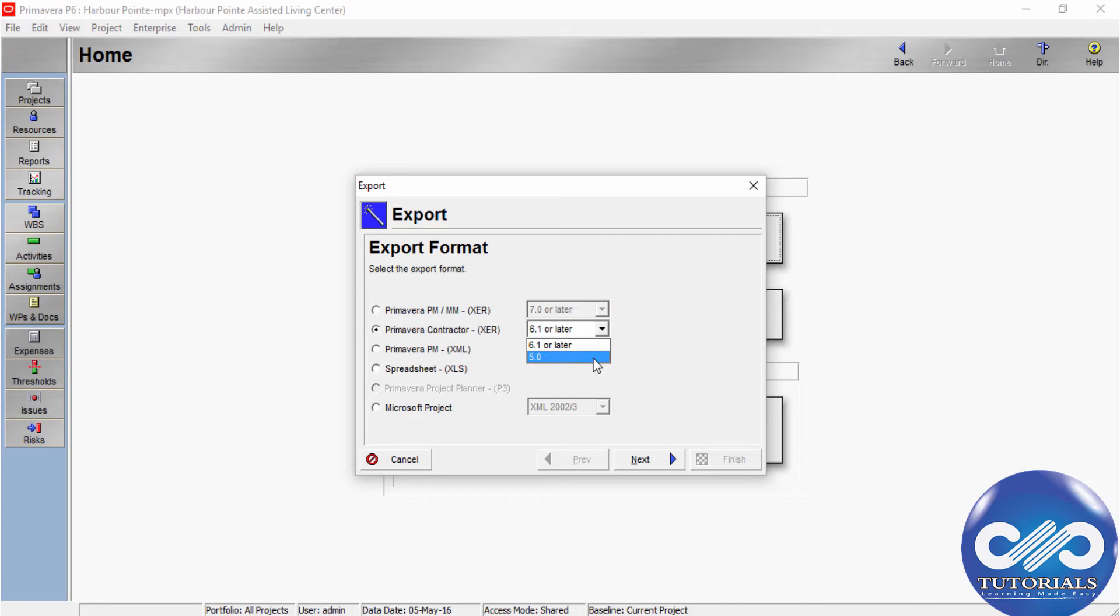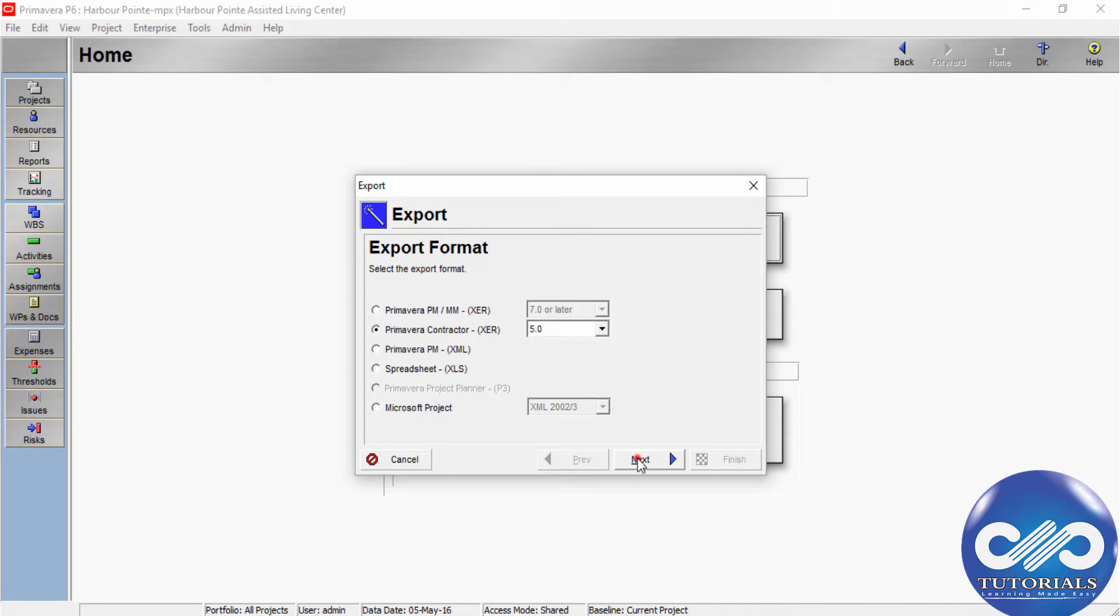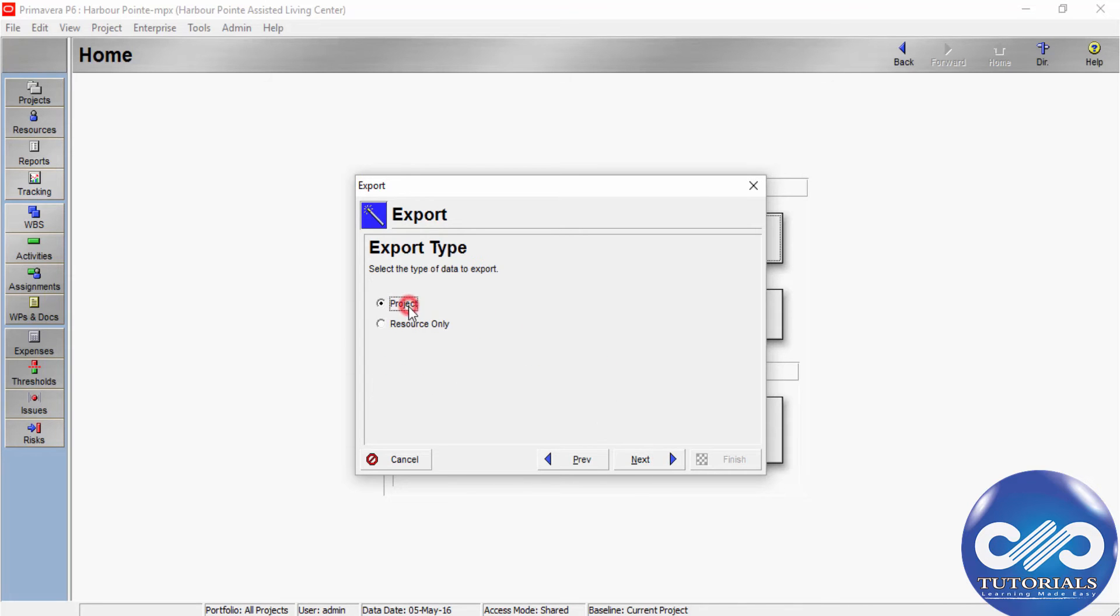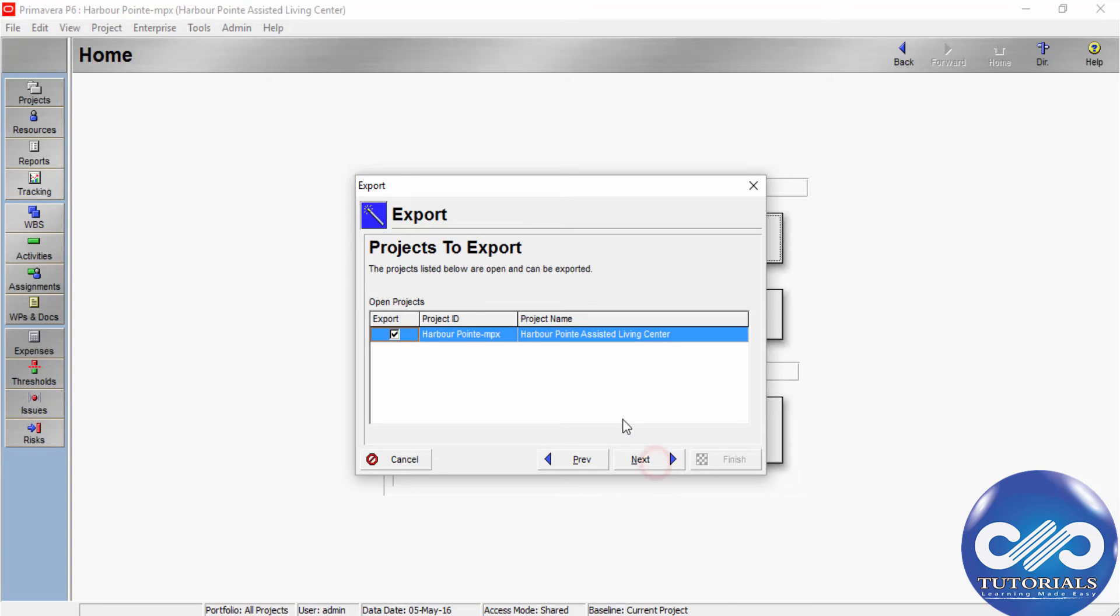version 5 or 6.1 or later, then click Next. Choose Project as export type and click Next. Mark the export checkbox next to the project you want to export. You can only export one project at a time. After selecting, click Next.